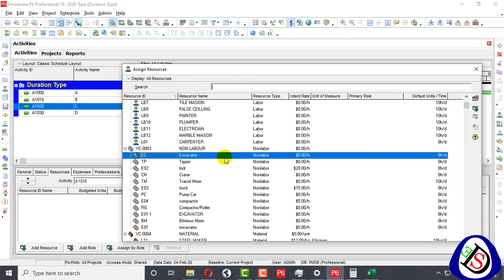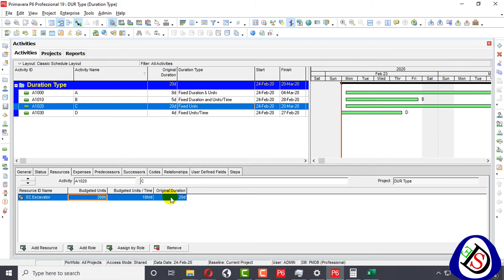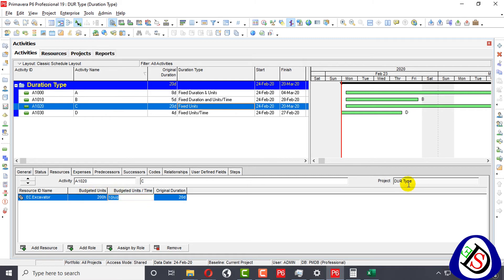I add an excavator resource. In Fixed Units, the budgeted units are fixed. When I change budgeted units per time, the duration can change and units per time can change. When I change my budgeted units per time per day, the duration will automatically be recalculated. For example, if total budgeted units are 200 and it currently takes 20 hours, if I set units per time to 40 per day, the duration will reduce to 5 days.